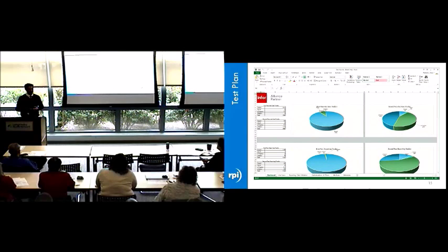When we talked about our methodology, we talked about the different passes and the different expected results of your first pass versus your second pass, and the test plan articulates that. When we do our first pass application exploration, we expect these outcomes. When we do our second pass, it's more rigorous, it's more involved. A test plan is periods of time. So the first pass test is occurring in these 2 weeks, 3 months from now.